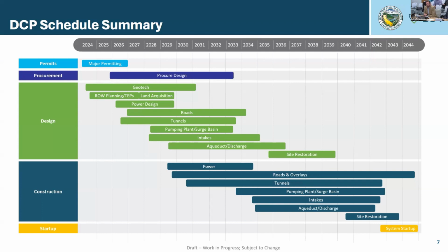The construction activities are key. Those really represent the start of significant investment and significant incurrence of cost. So those activities would start on preliminary or primarily on early works, making sure we've got the power in place, all the access roads, everything that's necessary to begin the major construction activities on the critical path features.